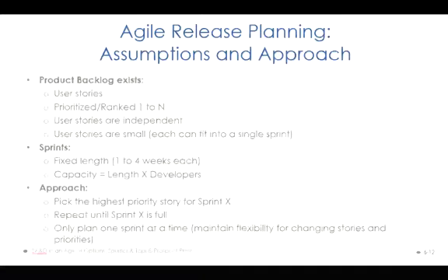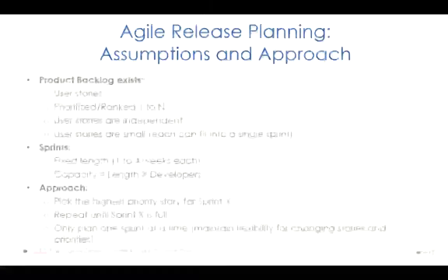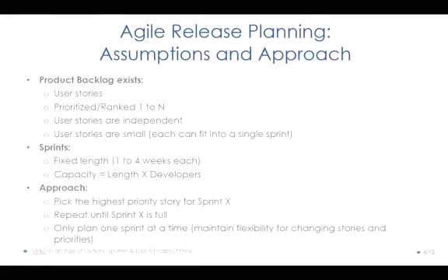In the Scrum methodology, one of the Agile methodologies, you use sprints and phases and try to map out the entire project in a reasonable time frame. In the reasonable time frame, again, we have a pretty good consensus already in the software environment. That is 1 day, 1 week, several weeks, 1 month usually, or no more than 6 months.